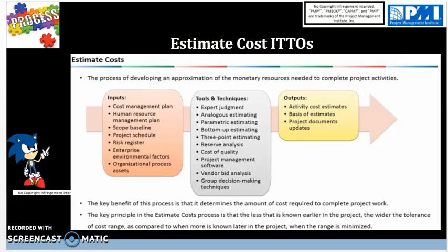The best type of group decision-making is unanimous decision-making, where all parties agree. An example of this is using the Delphi technique, where we send a questionnaire anonymously to experts to get input and make decisions. So doing that will reduce bias.